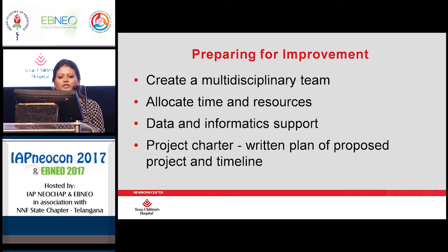So preparing for an improvement project, how do you get started? You create a multidisciplinary team. It's crucial that you allocate time and resources for this team. So if they have other clinical obligations, it's good to give them a designated set time that they can devote to this. You need support from data and informatics to do this well. And you want to create a project charter, which is a written plan of the proposed project and timeline. Here, I'll give you an example.